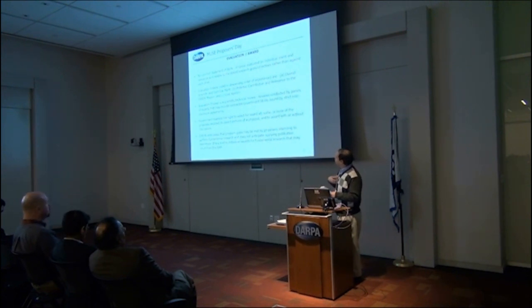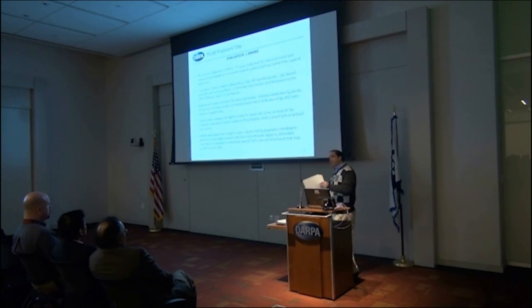As a contracting officer, I will tell you, please put time into that document for two reasons. One, it's just another way to ensure the government understands what it is that you are proposing, because they are going to be mapping that statement of work to what you say in your technical proposal, to what you say in your cost proposal. Those things should match. Also, that document is one of the few documents in the proposal that find their way into the award instrument. So the statement of work is physically attached to your award instrument if you're getting a FAR-based contract or an OT. Depending on the contracting agent, that may or may not be the case if you're receiving a cooperative agreement. But at the very least, it'll be referenced. So make sure you put time into those things.